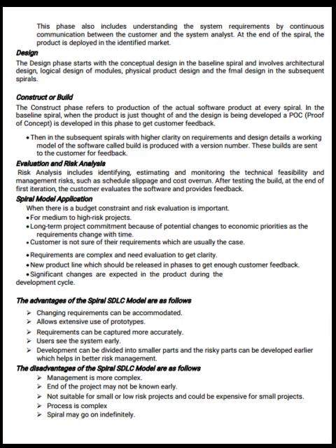Spiral model application. When there is a budget constraint and risk evaluation is important, for medium to high risk projects. Long term project commitment, because of potential changes to economic priorities as the requirements change with time. Customer is not sure of their requirements, which is usually the case. Requirements are complex and need evaluation to get clarity. New product line which should be released in phases to get enough customer feedback. Significant changes are expected in the product during the development cycle.